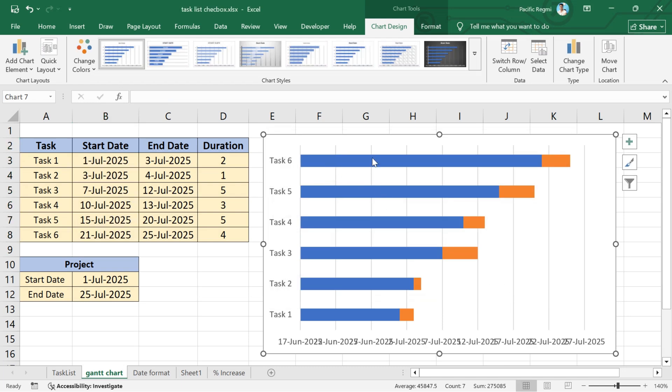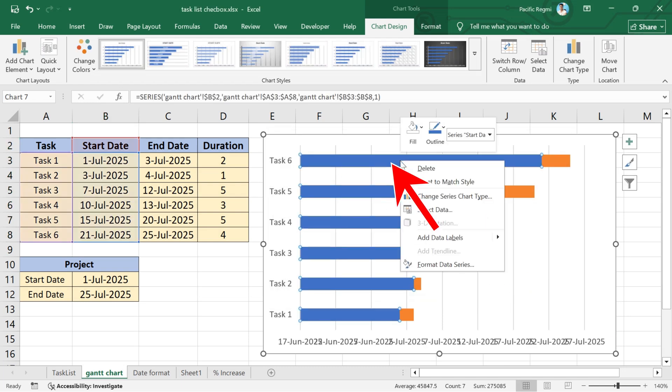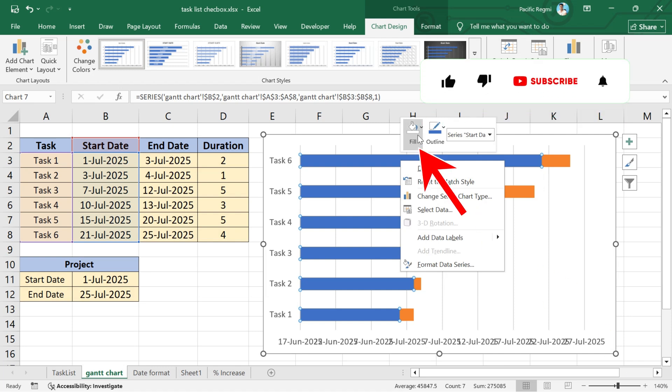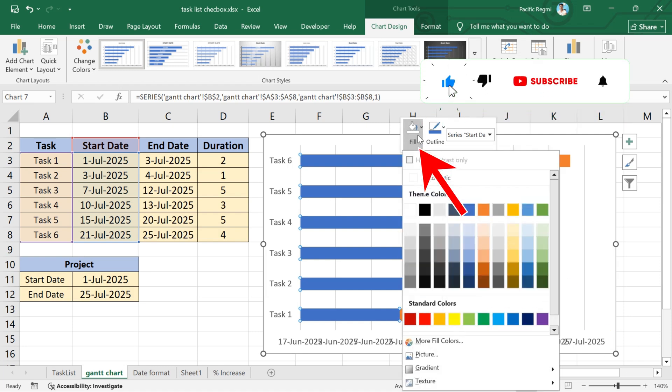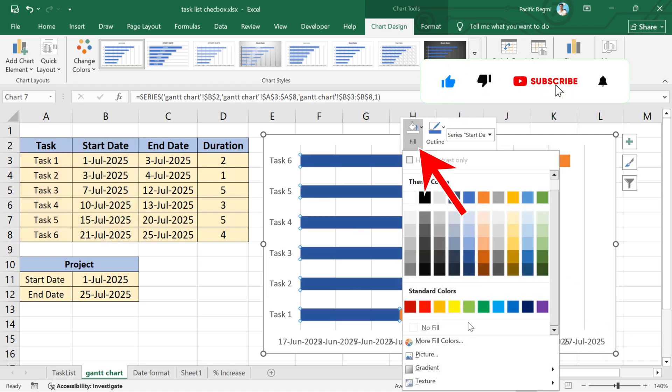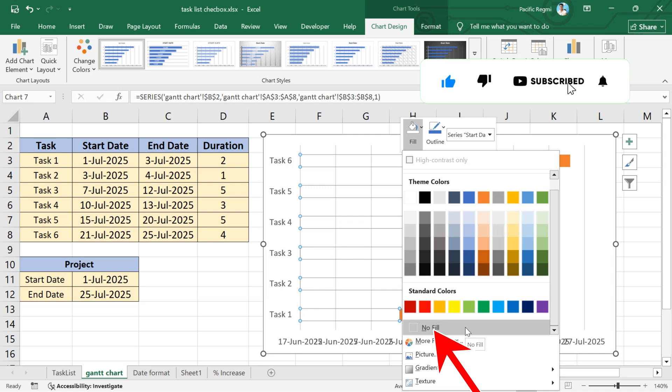Now, right-click on one of the bigger stacked bars. A pop-up menu will appear. Click on fill at the top of the pop-up. From the drop-down, select no fill.